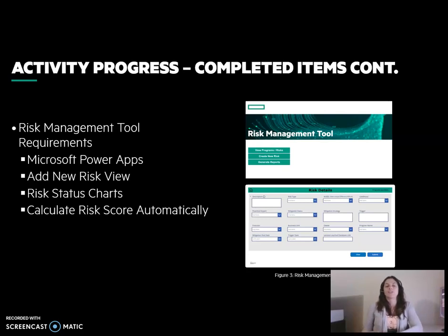We also want to add trigger and trigger date, which are concepts that we will also be introducing as part of our process, which is basically a sign that tells us when we can begin our mitigation plan. That trigger will start off our mitigation plan.